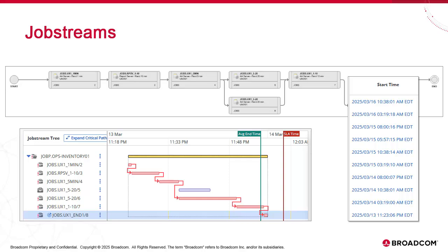We can start analyzing SLAs, critical path, statistics, averages, reporting, alerting, monitoring, and much more. If you select a job which isn't the last, then AAI will perform this analysis just as well. However, it only considers predecessors. Successors are ignored, and so your analysis will be incomplete.